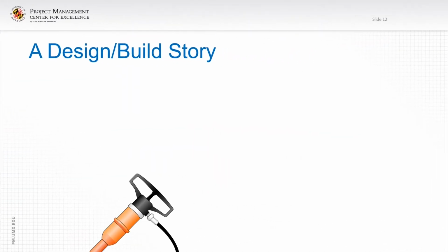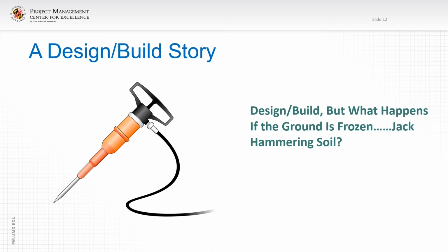So finally, a design build story. It's interesting, but I was involved in a design build contract in central Pennsylvania many years ago when they broke all records for low temperatures and snow. But what happens when the ground is frozen and you need to start excavating? Well, we found that the ground was not only frozen on the surface, but it went pretty deep into the ground. And the only way we could get started was literally to start jackhammering the soil. The soil was about as hard as concrete.